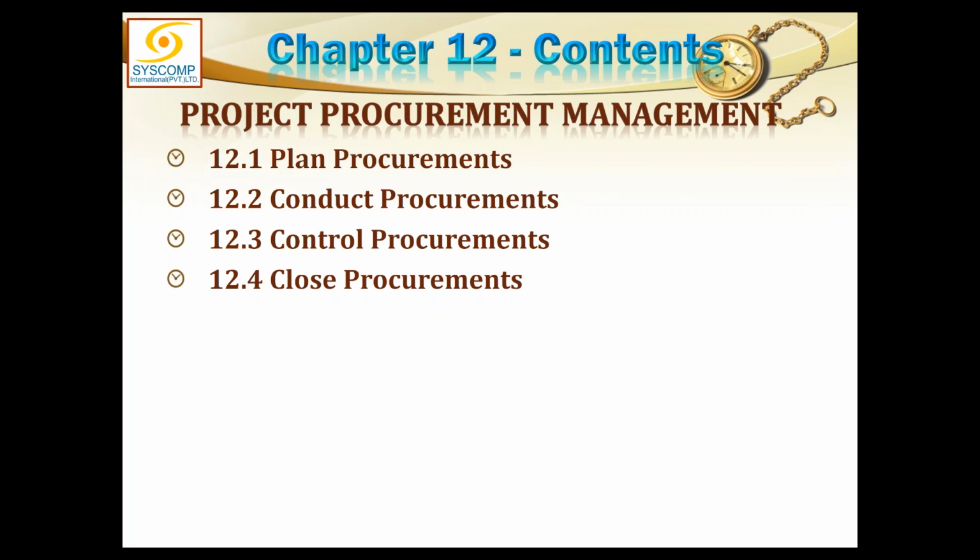Like your schedule says that this job should actually start on ground on 15th of July. You must calculate backwards and see how much sooner should you advertise and how much time it will require for the selection of the vendor, and ultimately when you are expected to award the contract to the subcontractor. So all the time required to do all this must be before the date of start of the job.